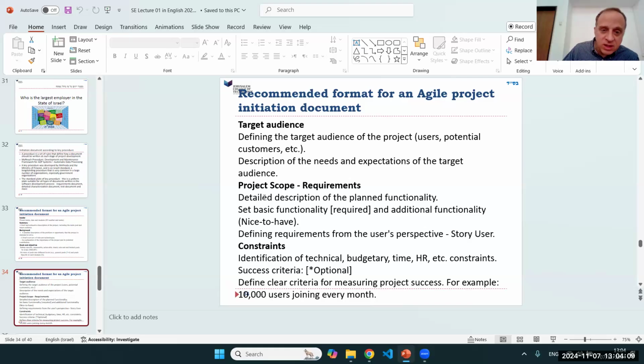But here in the project scope, you have to really figure out what it's doing and what is the purpose of each function. What does it achieve? And why is it different from the other function? And it's also helpful to group these functions into modules. Just say, okay, if I have 15 functions, 5 of them are all revolving around this. Then I can have a section called management of this.